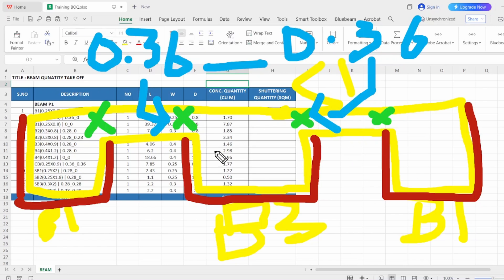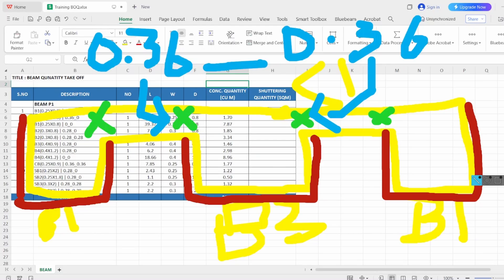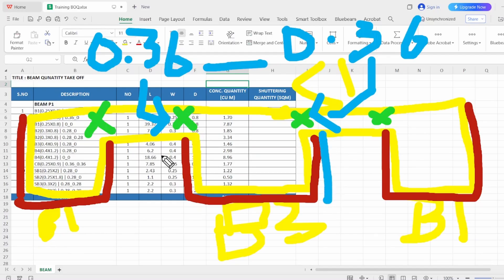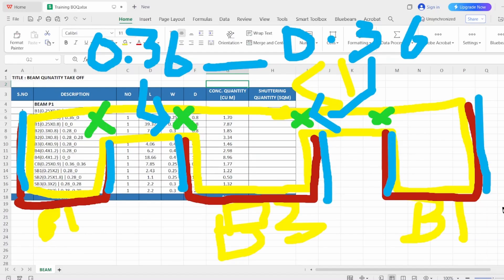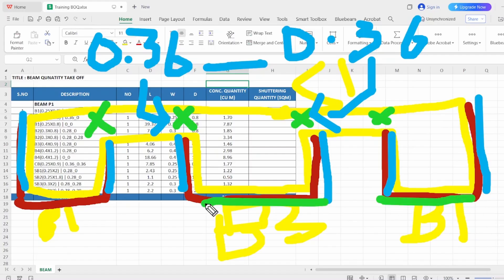So this is the concept we have written the description like that. That's it. Now one more point we have to understand: the beam has two portions of shuttering. One is sides of the beam—this blue portion is the sides of the beam. Another one is the soffit of the beam, it's nothing but the bottom of the beam. So the green portion is the bottom of the beam. You have to calculate both separately.